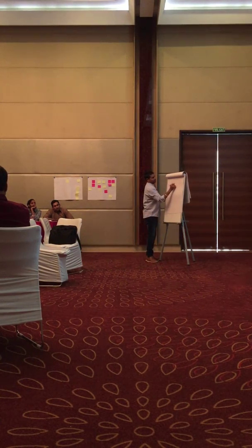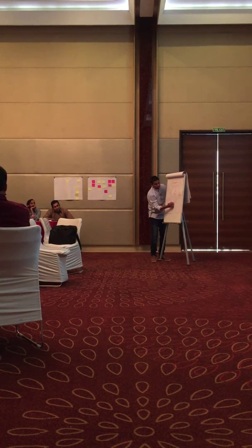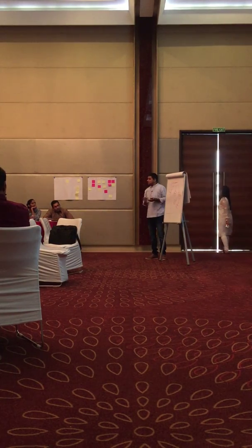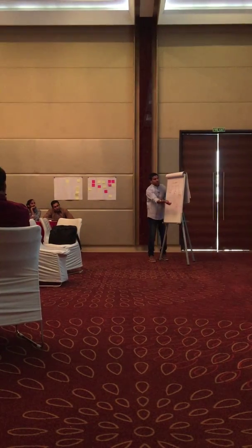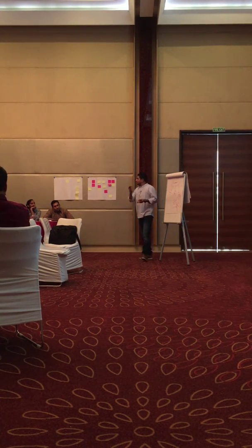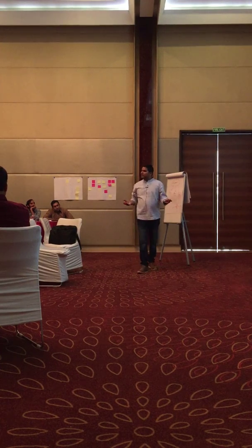User management is my epic. Add, delete, sort. This sort is a little bigger. So I want to add something like sort by first name, sort by last name, sort by email ID, mobile number. So all these are smaller user stories. Something if you don't want, I don't want this. So your size will be reduced. When it is 100, when you split, it will become smaller. So when you accumulate, it may become 100 or a little less, a little more.